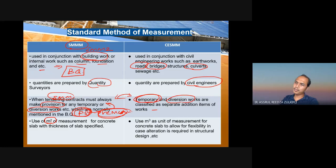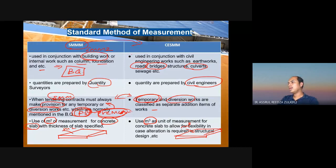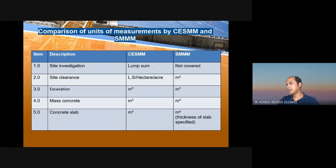A notable difference between SMM and CESMM is in the measurement units. For concrete slab work under SMM, slabs — which are floors — are measured in meter square because they have a thickness. Under CESMM, all concrete-related work regardless of thickness is measured in meter cube. This is the key difference between SMM and CESMM. For example, site investigation works under CESMM use the unit 'lsum', and site clearance uses meter square — these unit differences are captured in the slide.